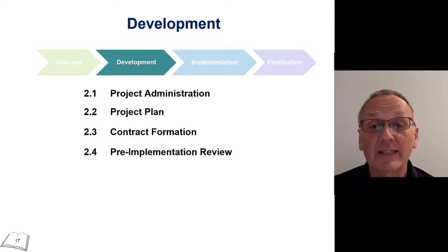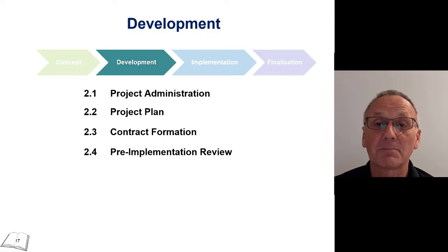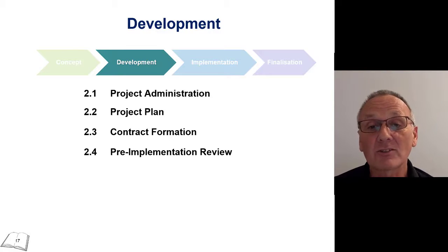So, but if you're not doing that and you're managing the project yourself, then contracts may actually be formed later on in the life cycle, and it may not be at this particular stage. But large contractors are doing large parts of the implementation work. Normally, you're reliant on their bids or their particular tenders to come up with the detailed costings associated with your particular project before you can really authorize the project to go past the development phase.